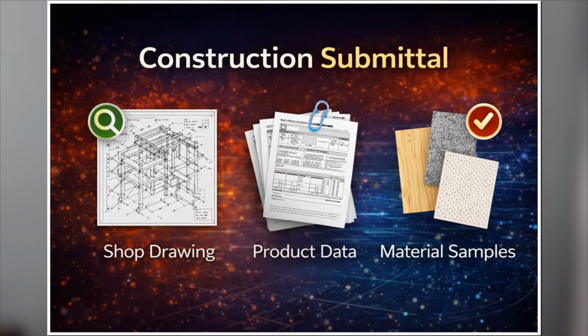In this slide, we're going to be talking about a construction submittal. A submittal in construction is information the contractor sends to the architect, engineer, or owner for review before buying or installing something on the project.